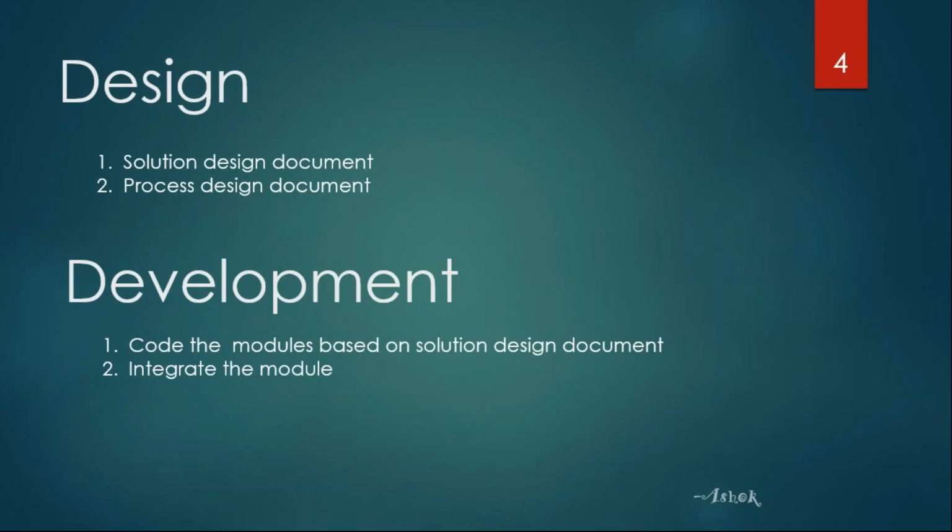In design, what will happen? This phase will be done by the solution architect, or tech architect, or team lead, or project lead. What that person will do is review the entire document. They will study the workflow, I mean, from which application to which application we have to move, and what operations we have to do in that particular application. They will review all these things. Based on the project size, they will divide it into modules. Modules are for development convenience.